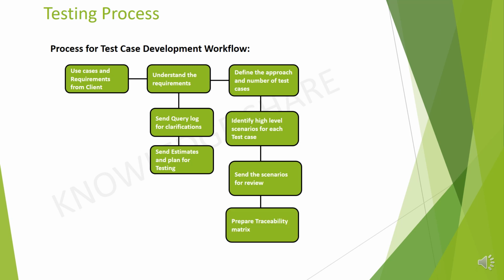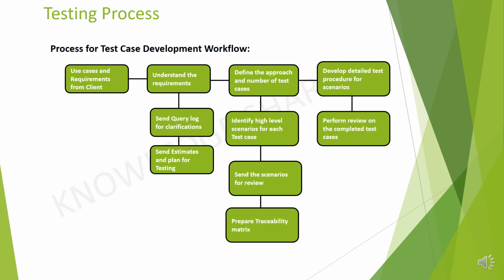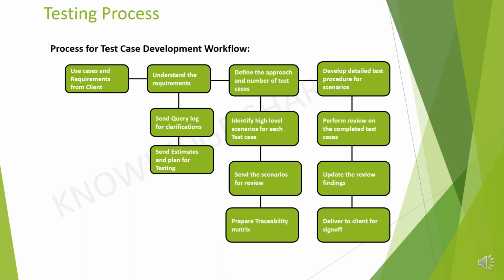Prepare traceability matrix. Then develop detailed test procedures for scenarios. Perform review on completed test cases. Update the review findings. And finally, deliver the test cases to client for sign off.